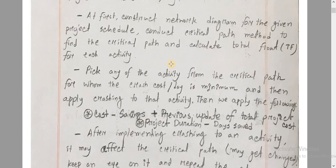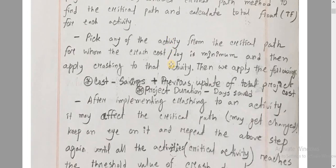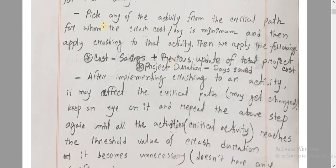So, the first step in project crashing is to use the critical path method where the critical activity is identified. The second step is to pick any activity or activities from the critical path for whom the crash cost per day is the minimum, and then apply crashing to that activity.